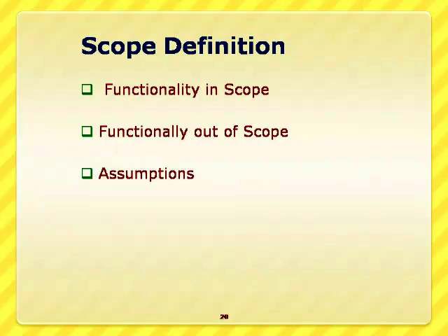These three factors are to be documented perfectly, so that all the stakeholders are guided by this document and implementation will go smoothly. Suppose I don't define the scope document properly, an influential stakeholder may come in between and ask for an additional requirement. To include that additional requirement, you may have to increase the scope of the statement, and thereby you need to redesign the data warehouse. So it is going to delay the project. That's why this scope definition document is essential for the implementation of the data warehousing project.